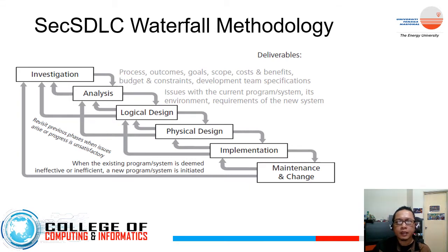Who are the people that are using it? And let's say you want to actually upgrade the system, what will be the requirements of the new system? This is very important because usually during migration, you need to see whether you have a backup of your current system. Let's say you are in a banking system. Of course, if you want to upgrade, you need to have a certain downtime because you need to perhaps update the software or perhaps update the hardware. So you see what issues will come if you want to do an update or an upgrade to your system.